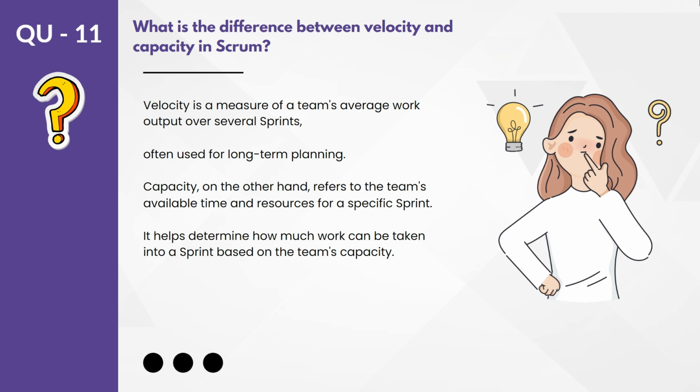So in full, 400 hours, if no holiday and no one is taking leave, then 400 hours of work will be done in one sprint. But if someone is taking off and there are public holidays, planned holidays, then in that case the capacity will be reduced. So that is the straightforward thing.